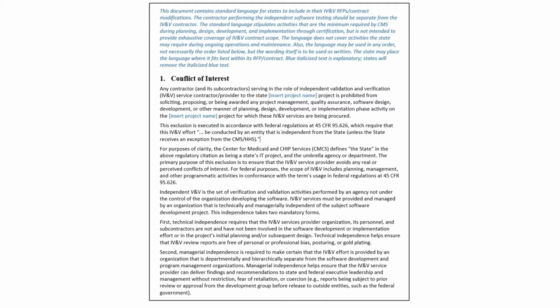However, the state may not hire the IV&V contractor to test software. True technical and managerial independence must be maintained. So, the IV&V contractor cannot report to the same state entity that manages the project. And, since the IV&V contractor will be reviewing the performance of the software testers, it cannot perform that role. A state may choose to hire a separate quality assurance contractor to perform software testing.